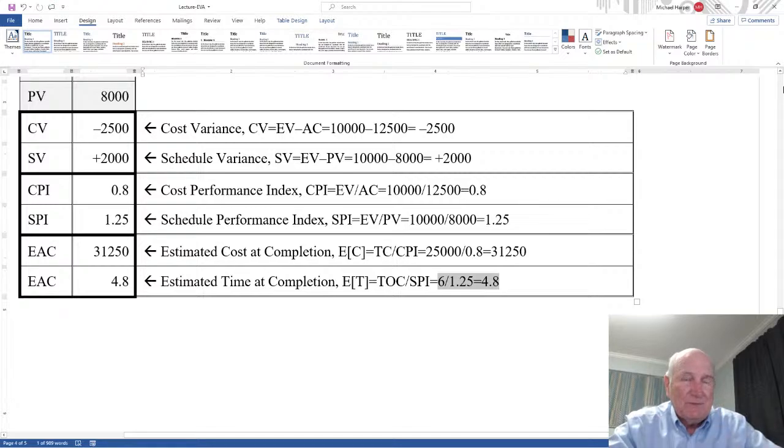But what about the money? They had to spend more. Yes, 1.2 months early, but then at the 6-month point, they'll take that revenue, offset the marginal cost, and offset the $25K. And they'll say our net after the revenue, because we got done early, was less than $25,000. So they could argue effectively we got it done early for a net cost of less than what we planned on doing it. And so they really look good in their management. And so that's an example of how this can be used.